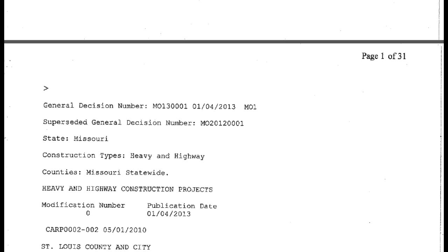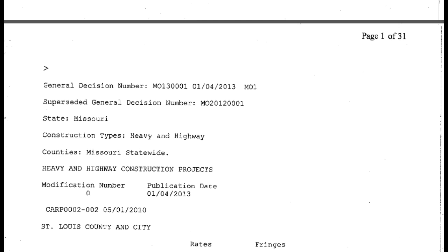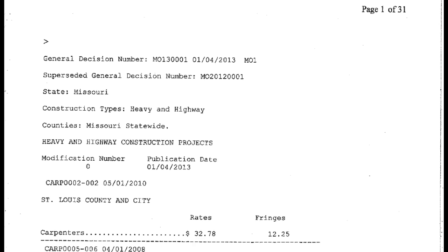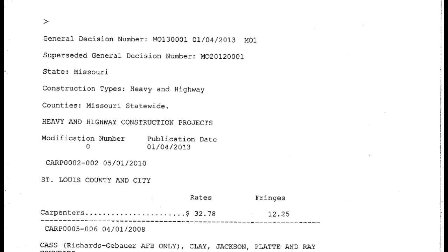They're going to interview your workers, ask them how much they get paid, and look at their pay stubs. And then you have to provide us every couple weeks, when you make payments to your employees, a schedule, a report that shows us what you paid to each of your workers.